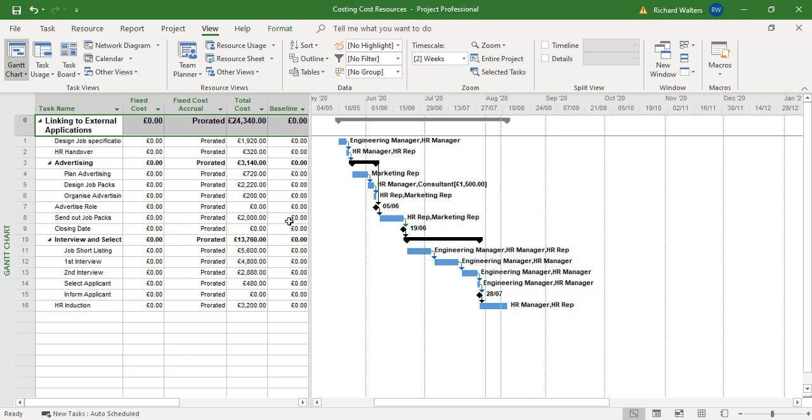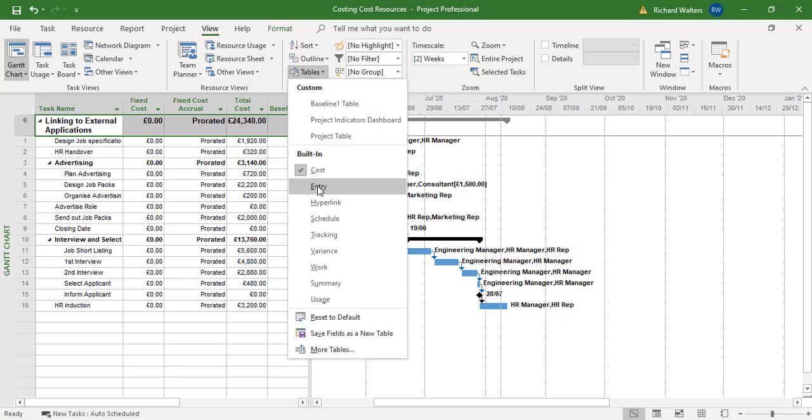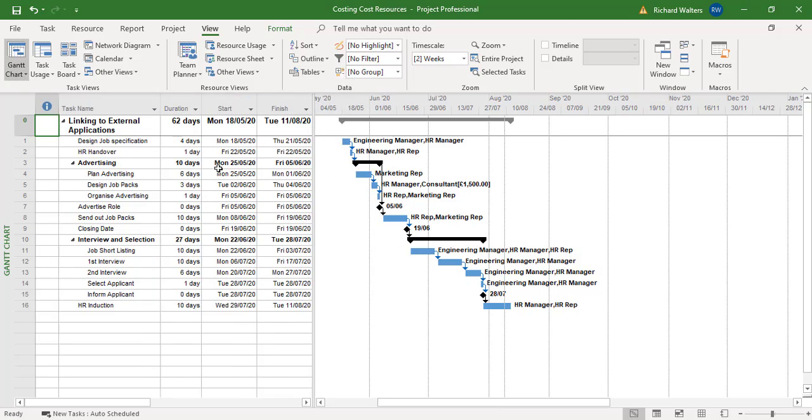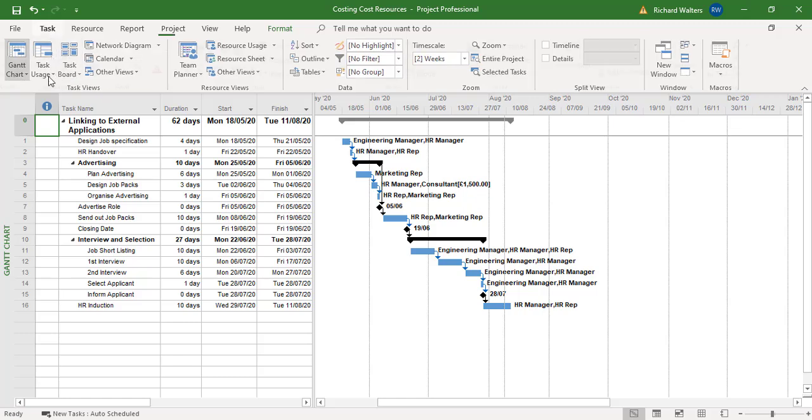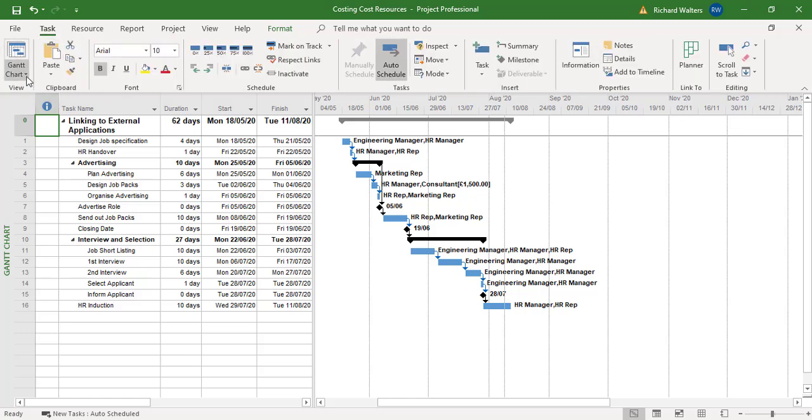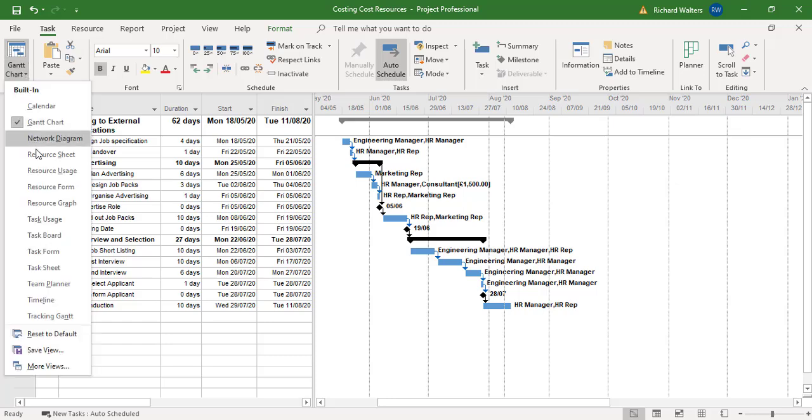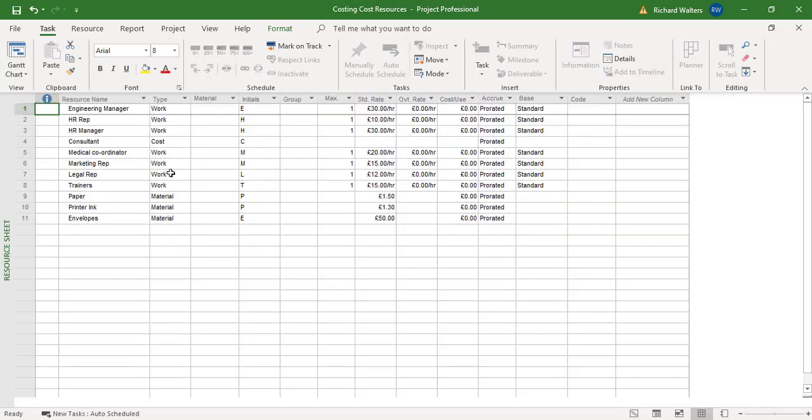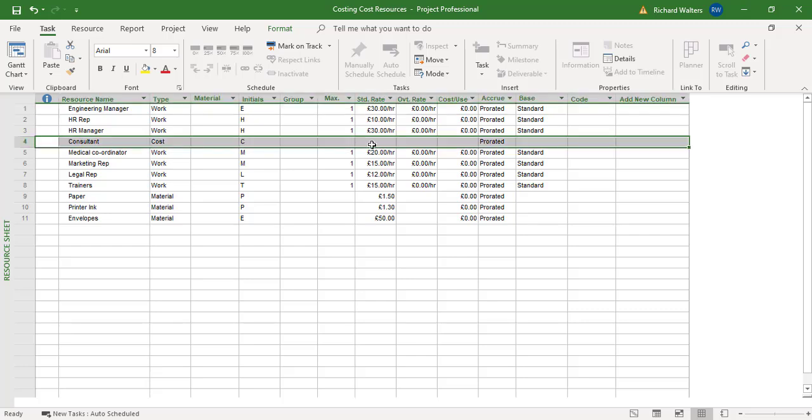So this is how you can manage cost resources and add in cost for a cost resource through task usage view. So I'm going to change the table back, but we can now see that the consultant has a cost and this couldn't have been put in through the resource sheet view, which is the standard opening view. So you can still see there's no cost showing against the consultant.